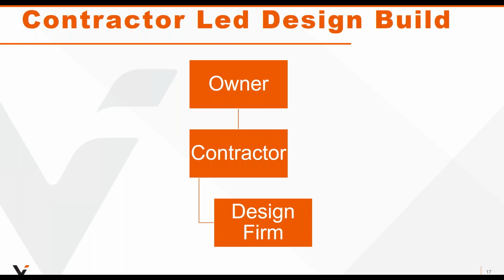Of course, by far the most common setup for design firms is a contractor-led design build. And when we talk about managing the risk later in the presentation, this is for the most part what we're assuming. You as a design firm will take the information provided by the owner and the owner's consultant and prepare a preliminary design that will allow the contractor to prepare a construction bid, right? The expectation is that there's enough information provided by you in this stage to allow the contractor to prepare a competitive bid.